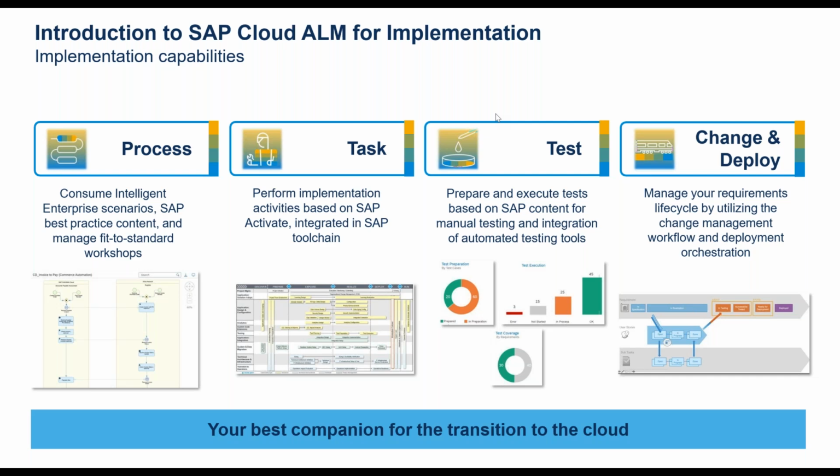In addition to that, when we get to the second pillar here, the tasks within Cloud ALM, you'll have the chance to automatically bring all of the Activate tasks directly into Cloud ALM. Therefore, you don't necessarily have to create these tasks from scratch, but you can have all of the roadmap tasks directly from Activate that you can start by assigning to users, etc. Depending on which of the Activate tasks are applicable for your project, you can remove some and you can add additional ones if required.